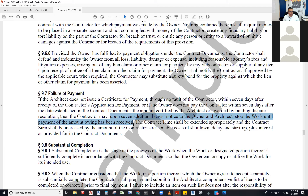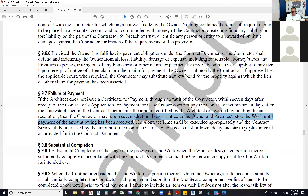A student asks: is the only other time the contractor can stop work when they discover hazardous material on site? The answer is yes and no. They can only stop the work on that portion of the scope — they have to continue working on other areas. First, they inform the owner and architect together, because they cannot talk to the owner directly — they have to go through the architect, so they contact the owner and architect together, perhaps by cc'ing the architect on an email.